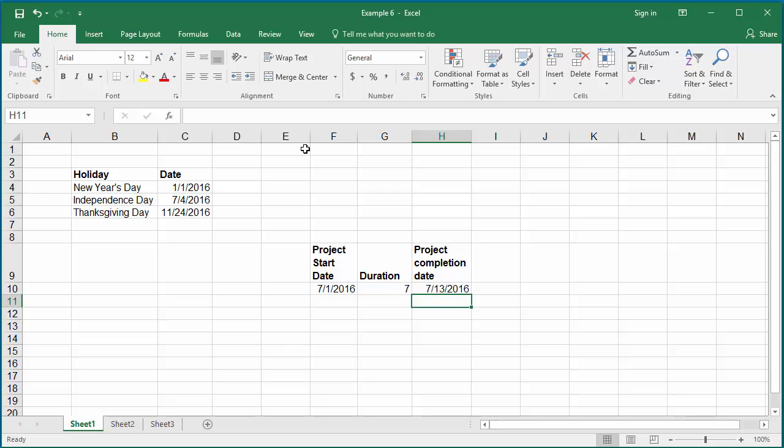You can see the July 4th holiday is excluded and one day is added for the end date.